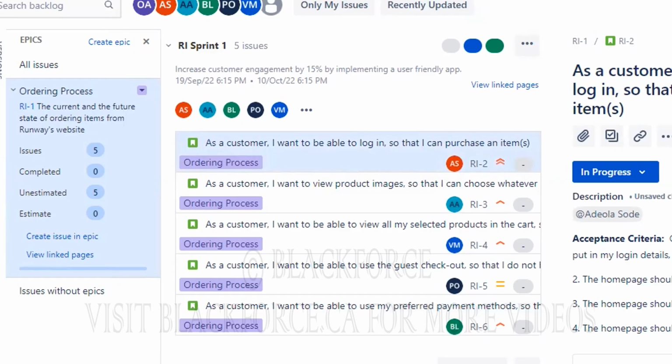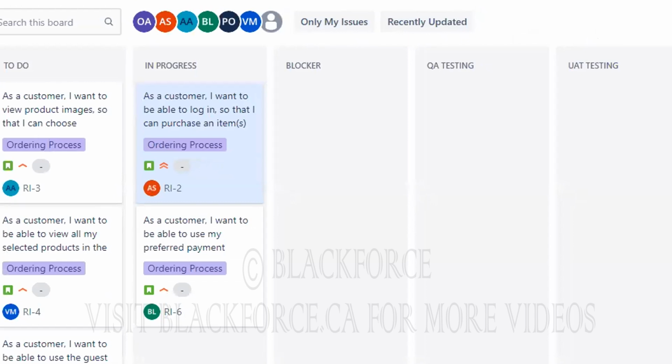Thank you, Bumi. So I'm going to talk over the process of the sprint that we have. So as we know, we have our epic already, and it's broken down into 5 user stories, and these 5 user stories are already assigned to each member in our team, which is 5 team members. We also gave ourselves a time limit of 3 weeks, which is what we all agreed would give us enough time to go through the process from the beginning to the end.